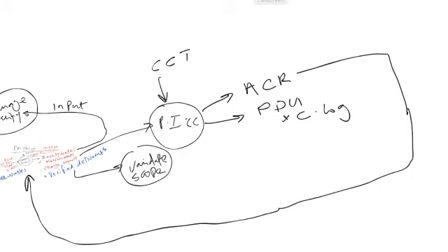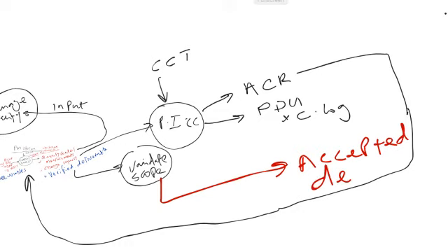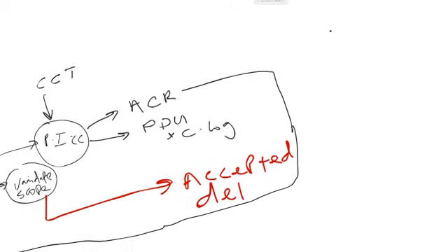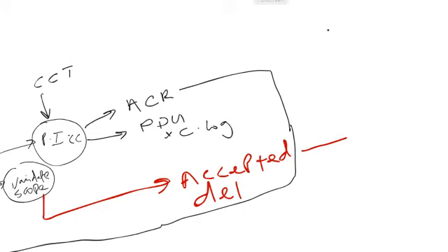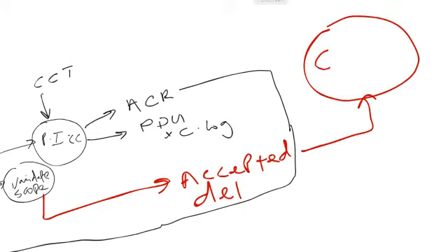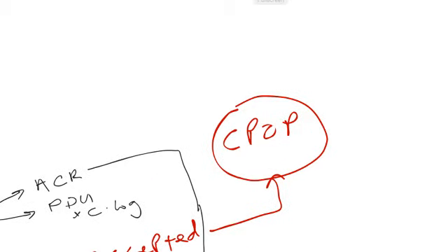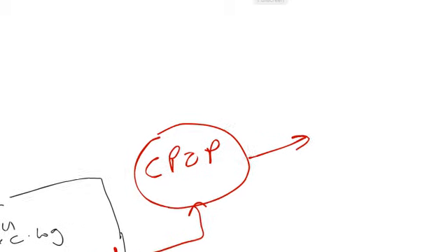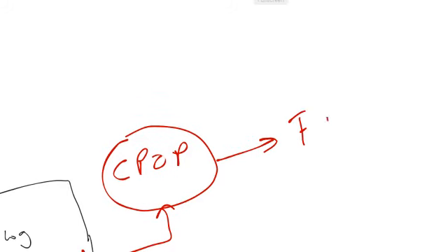You see, from validate scope, you're going to end up having accepted deliverables. And those accepted deliverables, their journey is going to continue on to close project or phase. And from here, you're going to have your final product, service, or result transition as an output.